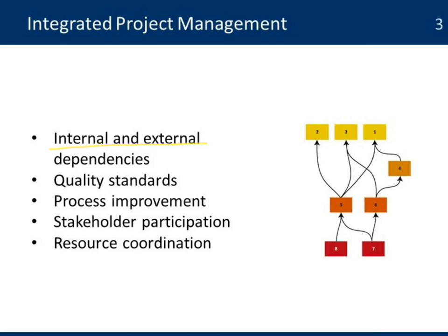That means that the project is not only working from a set of activities, but there are also activities that are happening outside the project. They may be from another project or a partner or even the community that need to be integrated, and they are dependencies that are created with the project. It could be that we need to have something completed, like approval of the legislation before the project can begin, or improvement of certain roads before the project can access a community.